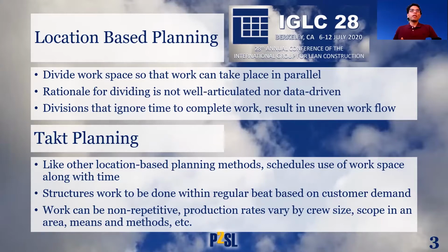To give some background on the research, we are working with location-based planning. There are several methods that allow planning by location, and sometimes even project teams don't use any defined method and just divide the workspace into areas to allow parallel work. It is beneficial to them as crews can work concurrently, yet not be in each other's way, shortening the construction schedule and increasing the overall productivity.